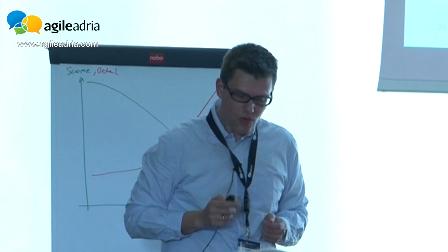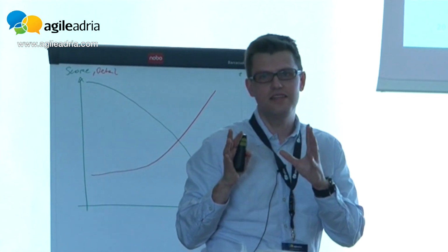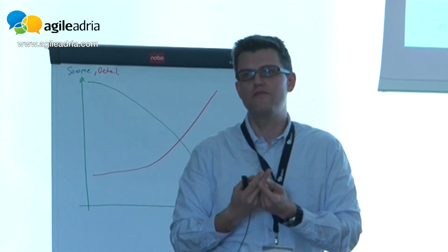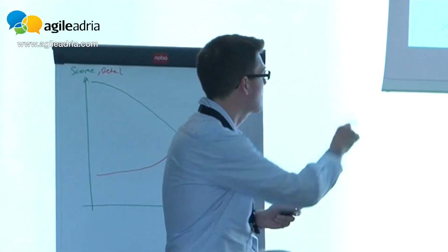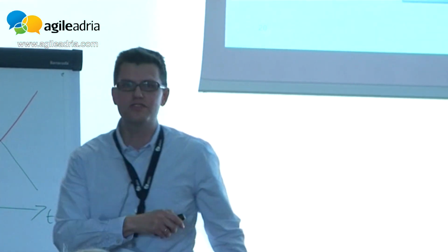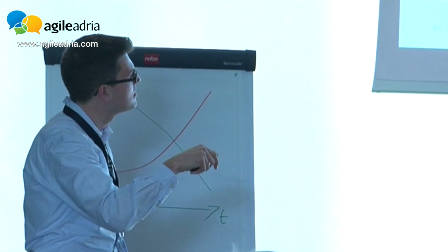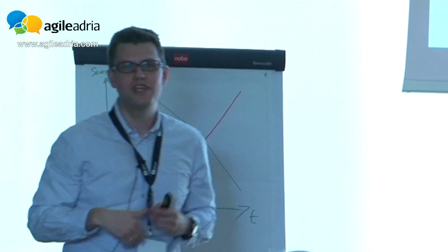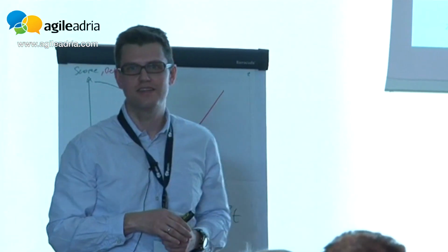And why is this so important? Because this is my walking skeleton I need in order to get the first valuable feedback from my users. Because if you think of a map of your product backlog, and of course you have much more than these user stories, and you start building your product like this, the first time the user will actually give you real feedback is when you're almost done.